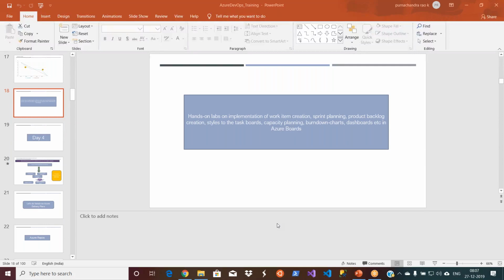So today we will see the capacity, because yesterday we were not able to make that proper. We only saw green items. We also need to see how it becomes red, meaning however project timelines get extended, that means you will not be able to deliver it. In such cases, in a manual way, you move the requirements to another sprint, or you take out requirements from the current sprint, or you add another developer to the sprint. That's how you manage it. You will see those things here itself.